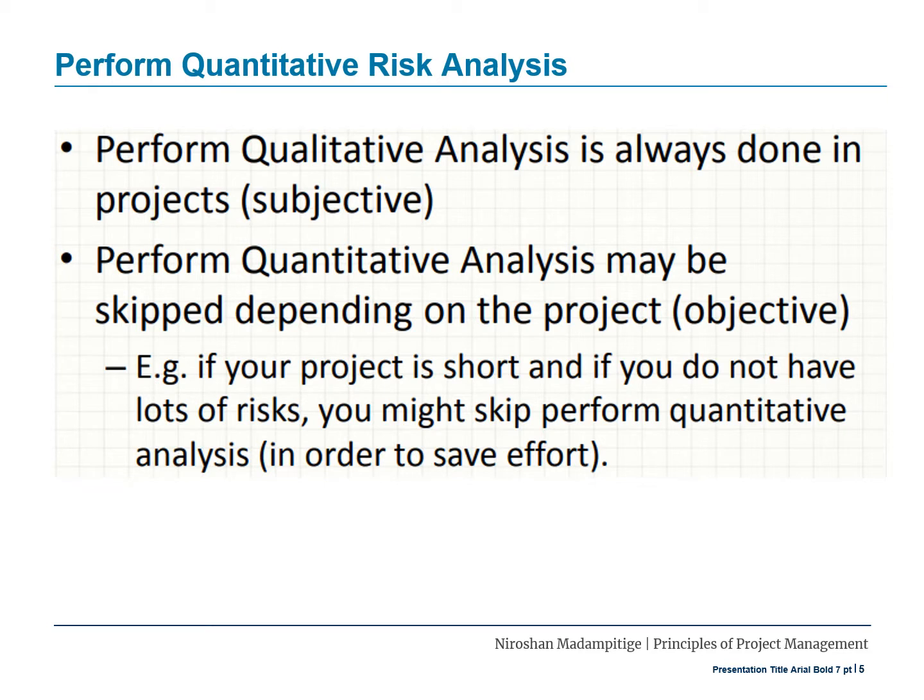Perform qualitative analysis is always done in projects. It's subjective. Perform quantitative analysis may be skipped depending on the project. Example, if your project is short and you do not have lots of risks, you might skip perform quantitative analysis in order to save effort.